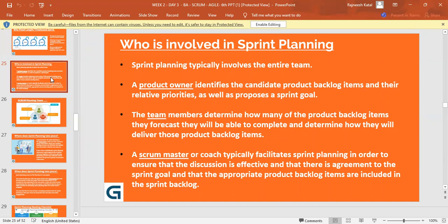Somebody's leave, some unplanned things, or some event, or somebody going to a conference from the office. There are many things. Many senior level meetings are there, and some team members are a part of that particular organization. Organization means in companies they also have some DevOps group or some .NET group and Java group and whatnot group. They have a BA group. So they have to consider all that, and say, okay, we will be able to finish the audio part. The video part we can take up in the next sprint, right?